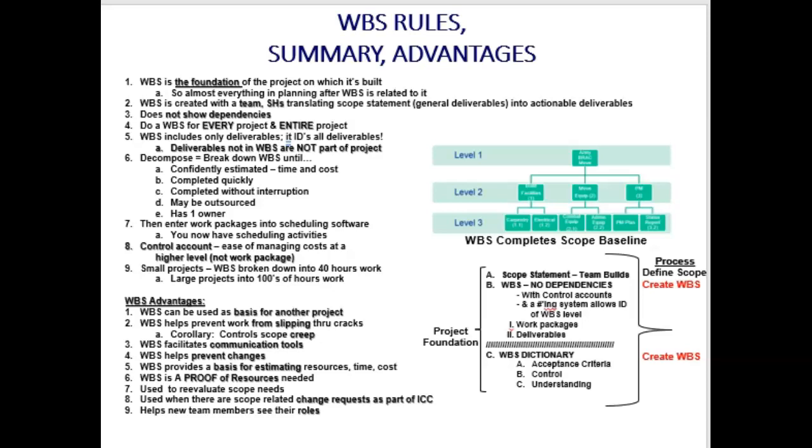And so underneath, I'm tying the scope statement to the work breakdown structure. So notice a few slides back, we built the scope statement, right? The team actually built that with you. Then I was able to break that down through decomposition into the hierarchy. There are no dependencies in that hierarchy picture above. There are no dependencies indicated. These are just how packages relate to each other to satisfy scope.